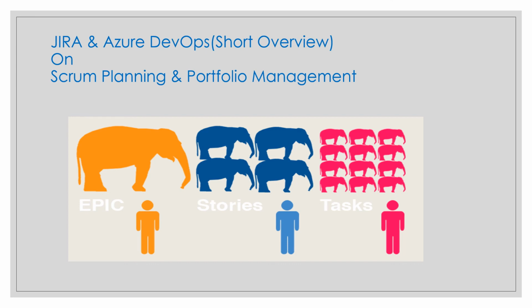your burndown report, your team, your capacity, and that release burndown report will help you understand how your team is progressing towards the completion of the version. And the report shows your team velocity relative to the current version, how scope changes have affected the progress, and the estimated number of sprints needed to complete the remaining work.